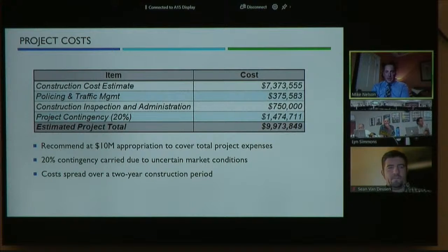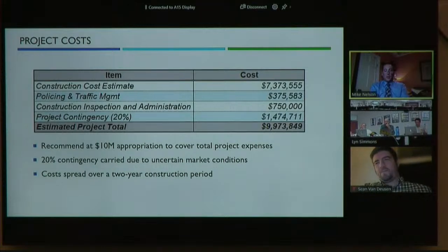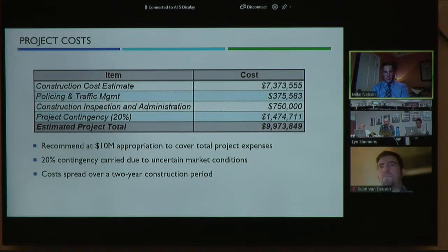Safety for traffic management and traffic maintenance during construction. We are working with large diameter water mains. As we mentioned, we're very close to the source. Pressures are high, the flow is high, and construction sequencing matters. 16-inch and 12-inch water main, those are fairly big diameters. Full-time construction inspection for the duration of construction. And last, a healthy project contingency.